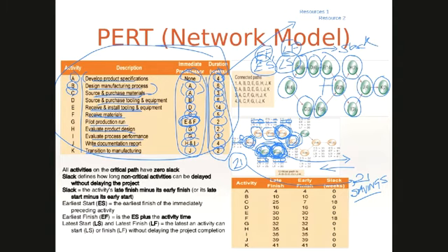So G can only begin when E finishes, which is 30, right? You have to take the highest of competing sets because, frankly speaking, for E, you can't choose anything less than 30, because it's going to take E 30 weeks to complete its activity or its task nonetheless.